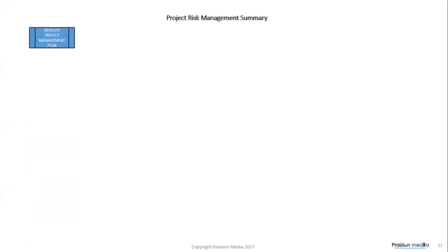First of all, understand that for every knowledge area, you have the presence of a project management plan coming into that knowledge area. So risk is no different. Risk is where you see two very important processes contributing to risk management. One is develop project management plan, and two is develop project charter. Remember, the project charter contains those overall project risks. So it makes sense to have some mention of the project charter as an input here.